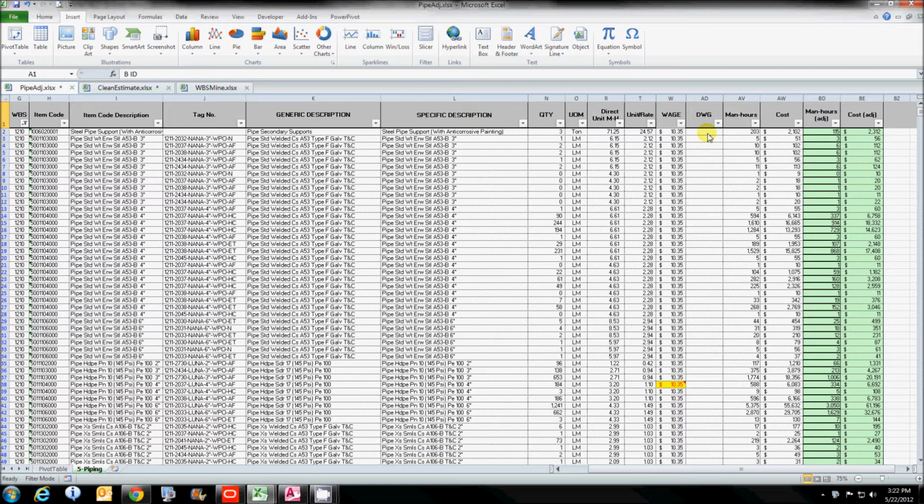And in fact, if we had had them, that might have been the sequence that we would offer. We would try to work everything. We do have the size of the pipe here. And I can't say I fully understand their coding system, but that would be one thing to look at. Had we had drawings or something to organize this thing, I would try to put all of the drawings together, work out some kind of a sequence with my superintendent so that I know that he's going to try and work on something. What he works on within that drawing, I don't really care.